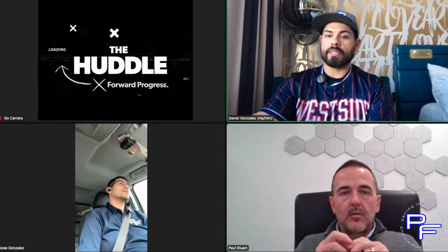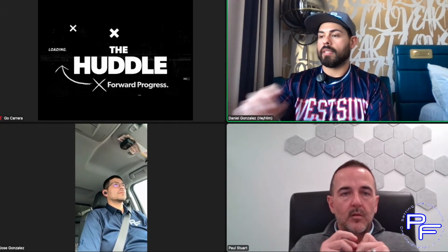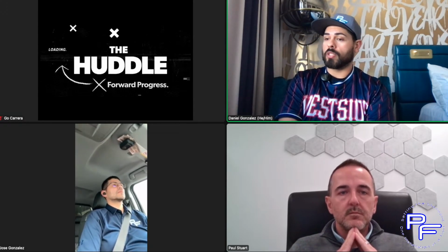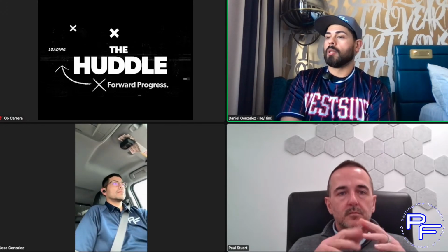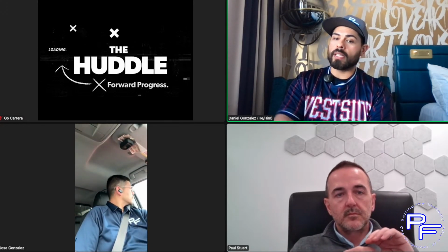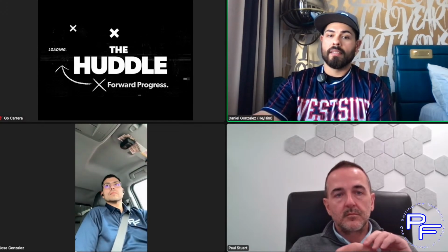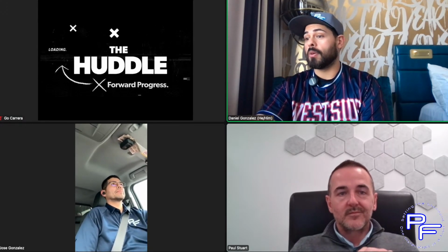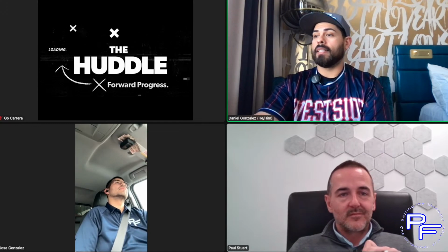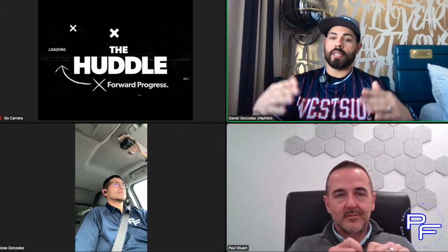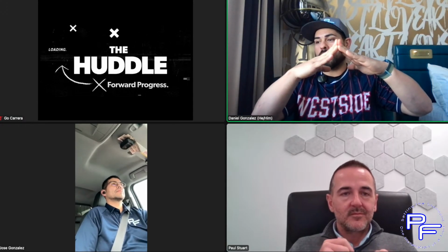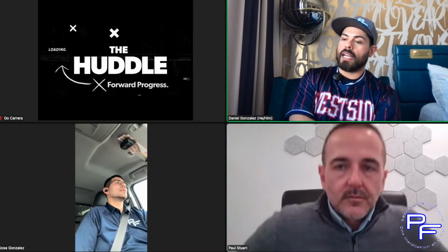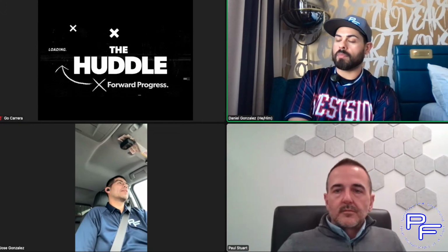Or we'd like to go walk the job first, so we'll put in there, and we'll mark it on the print too, and we'll say this cut joint was peaked, so it includes grinding on this cut joint. But especially when you're bidding and you're going in blind and you can't really see anything, like say new construction, you get the plans before anything is even going up, and then you walk in there and during the construction of the concrete, they put in a bunch of additives. You walk in there and every cut joint is peaked up, right? So what we do is, we assess that after the fact, and since they already know that it's cosmetic only,